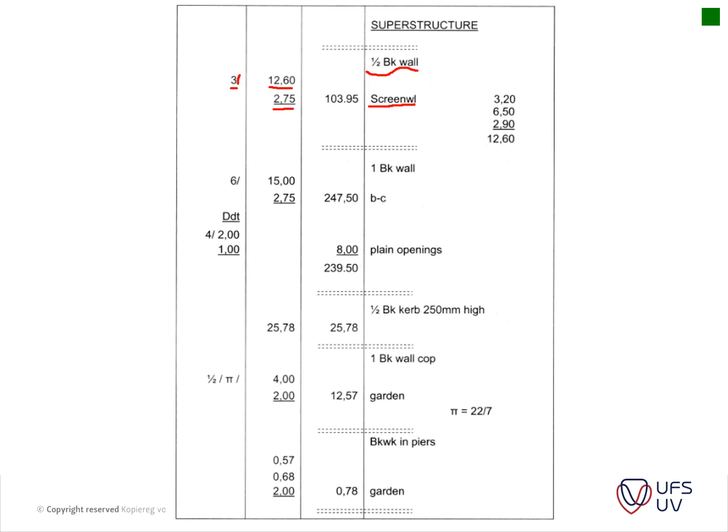So this little item here is known as a multiplier, and if there's no stripe underneath an item, then it's multiplied with that item. Okay, so very nice and so on. So don't break your head about this. I'm not going to test you guys on how these measurement and squaring papers actually work, but you just need to know that the QS usually does a measurement like this, and then takes the quantities, adds them together, groups them together, and then adds them to the bill of quantities.